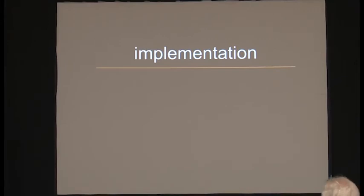We need to take projects and put them into small bite-sized pieces so that when a funding source becomes available, so I think you've heard a lot with the Recovery Act, with the stimulus, what happened was they looked for projects that were shovel-ready, and those were the ones that got funded. So it's that same kind of opportunistic planning. So let's make sure that our projects are the ones that will be funded in whatever round of programs happen into the future.